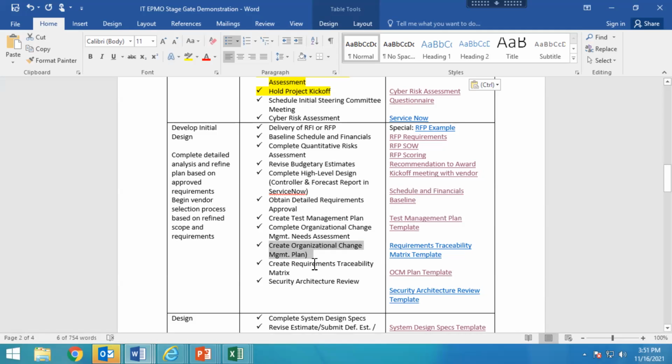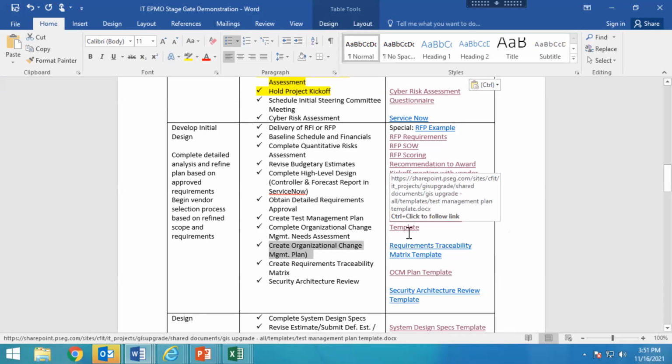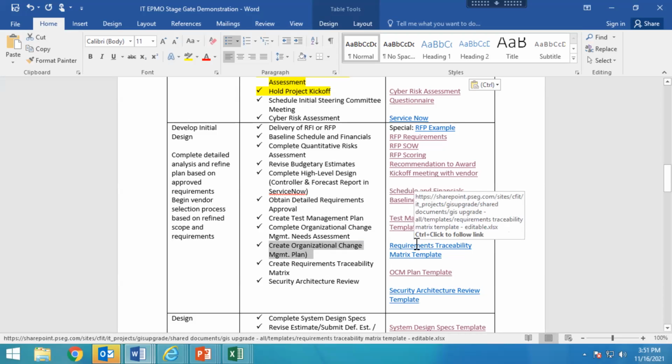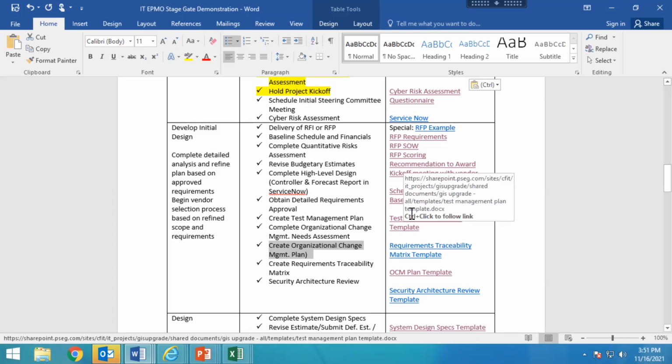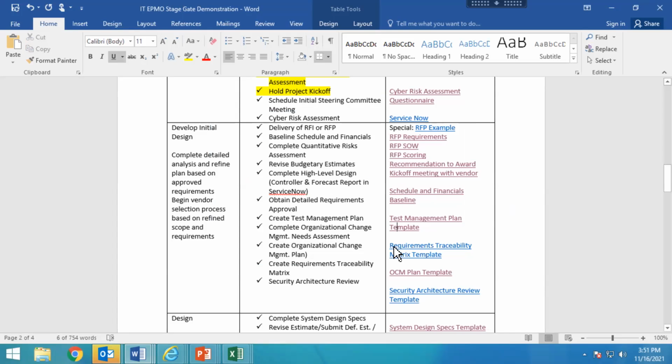But I just want to show you, they're also helping with this requirement traceability matrix. We have all those discovery workshops, and out of those, we're capturing all the detailed requirements. So they're helping to build this as well. And this matches a business requirement to a system requirement to a test case. But let me just bring up a few of these here. I'll show you the template.